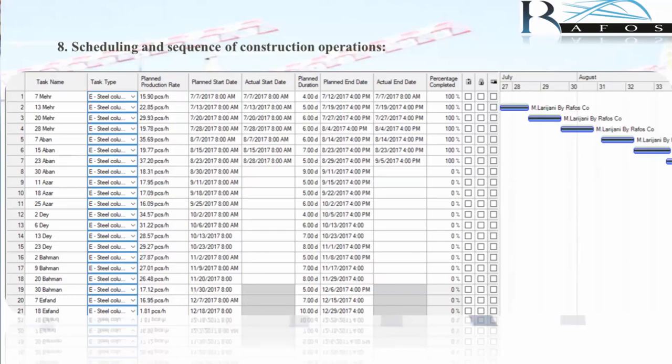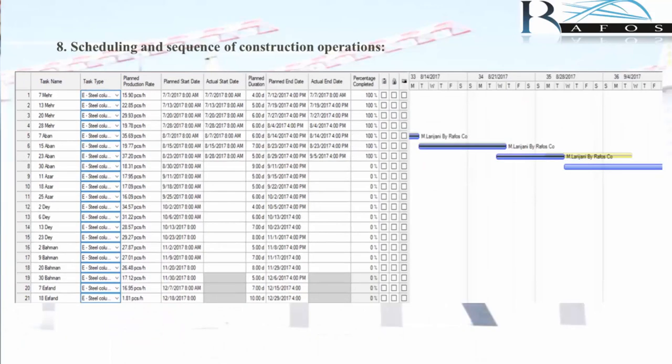like all management software, you will be prompted for the scheduled start and end dates of project parts. But we all know that, for different reasons, scheduled time may differ from the actual schedule. That's why Tekla asks for the actual start and actual end time of the project's different parts. Accordingly, it determines the progress of the project based on the current speed and estimates the completion time of the project. When the actual time of completion of the project is more than planned, the project is visually bankrupt.